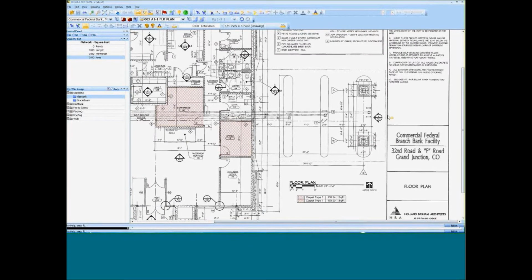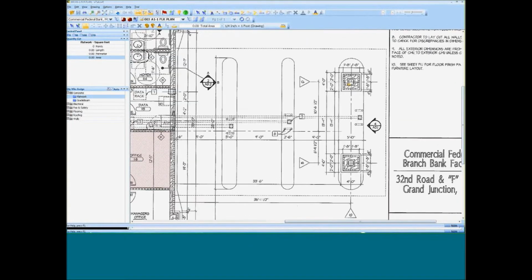Well, if I'm going to calculate flat work on this island here, I've got to do multiple things. I've got to do a curve right here, an arc, and I've got to take these columns out that hold up the canopy. Here's how it works. It's pretty simple. You point and click. Curves, all you need is 3 points, 3 measurement points on a curve. 1 at the beginning, 1 at the middle, 1 at the end, shortcut key, and it calculates the curve for me. And then again, 3 points on this end, curve, curve, curve, 3 points, shortcut key.